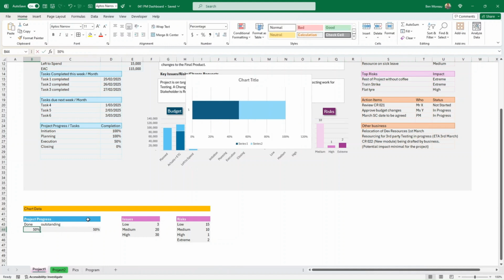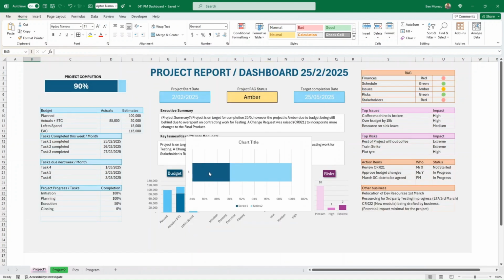So it works very well: 10%, 20%, 50%, 80% even. But when you go beyond 85 or 90%, it changes the scale. It just puts 84% as a minimum and 100% at the maximum. And I don't think you want to do this, because people would look at that quickly and see, oh, there's not much progress here.